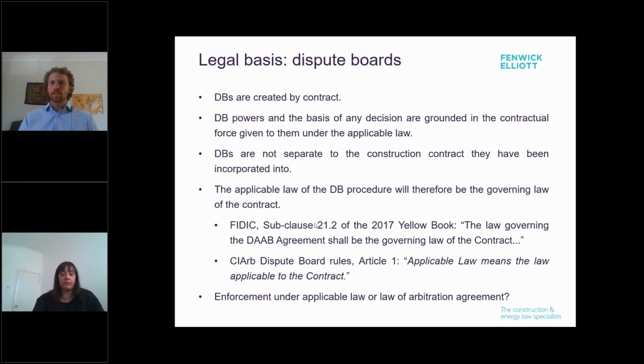Okay, the legal basis of dispute boards is a much shorter story. DBs are established purely by contract, and this means that dispute board powers and procedures can be whatever the parties decide them to be. The powers given to the dispute board will be grounded in the contractual force provided under the applicable law, i.e. they will be enforceable as a contractual obligation.